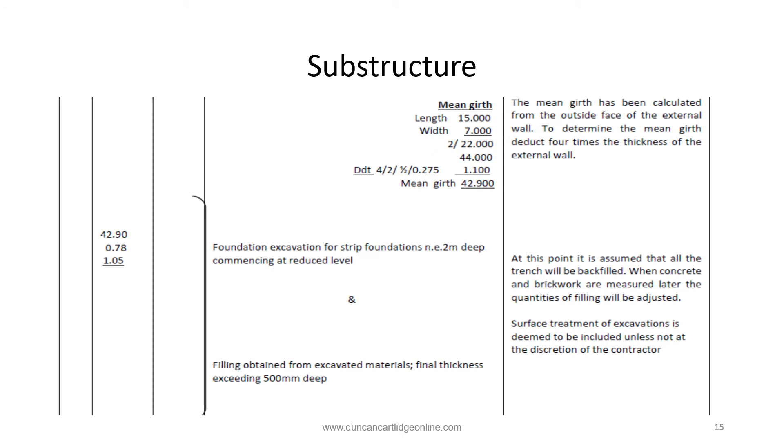The next item on the taking off list is the foundation excavation and for this we will need to calculate the mean girth or centerline of the trench. Once calculated we will be able to use it for a number of items. To calculate the mean girth from the external dimensions add the length and width together and multiply by 2 and then deduct 4 times, twice times, half times the thickness of the wall in this case 275 millimeters to give us 42.9.